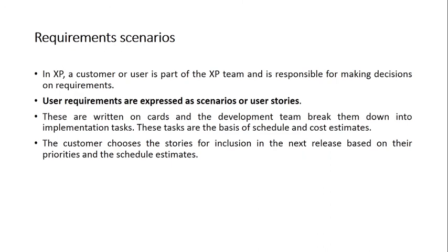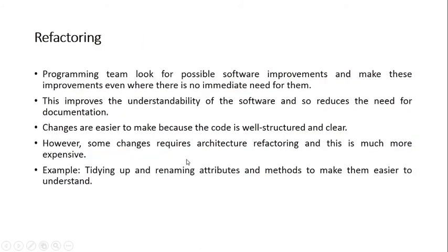Now what are requirement scenarios? I have told you the requirement scenarios are nothing. They are written in the form of stories on the cards. We call these requirements as user stories, which are broken down into tasks and subtasks based on schedule and the cost estimate. The customer chooses a story for inclusion in the next iteration based on their priorities and the schedule estimate. So customer is going to prioritize the requirements, right, in each cycle, and then you are going to develop it.